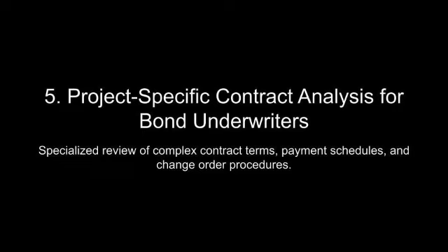While these discounts may improve cash flow for contractors, they can strain subcontractor relationships if payments are expedited without sufficient liquidity planning. For example, a contractor utilizing discounts to secure a financial edge might inadvertently delay payments to their downstream partners, creating friction and increasing the likelihood of performance issues.